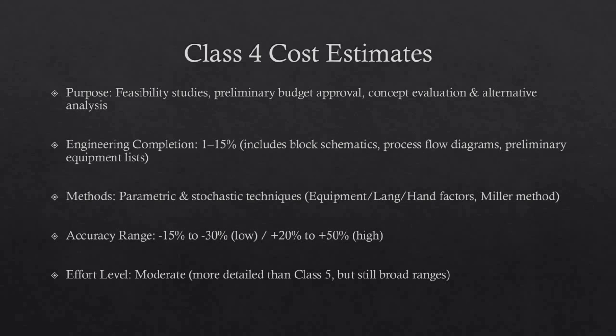Class 4 estimate purposes include alternative scheme analysis, confirmation of economic and/or technical feasibility, and preliminary budget approval or approval to proceed to the next stage. Class 4 estimates virtually always use stochastic estimating methods such as equipment factors, Lang factors, Hand factors, Chilton factors, Peters-Timmerhaus factors, Guthrie factors, the Miller method, gross unit cost ratios, and other parametric and modeling techniques. Typical accuracy ranges are minus 15% to minus 30% on the low side and plus 20% to plus 50% on the high side. Ranges could exceed those shown in unusual circumstances.